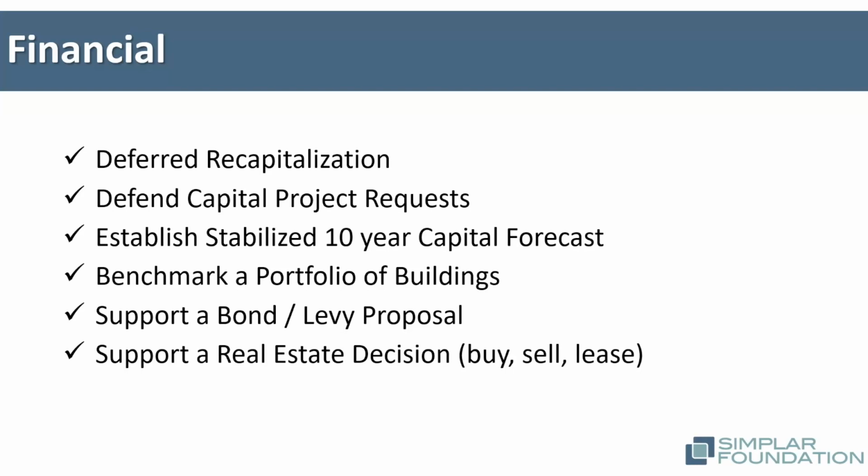And so what a good facility condition assessment will do in terms of the findings and outcomes is lay out a 10-year capital forecast, a comprehensive look at all those assets, and put a roadmap together so that a funding projection can be used not just for 1 year, 2 year, or 3 year, but 5 year, 10 year, and even longer, based upon how long the organization is going to own that particular facility or building.